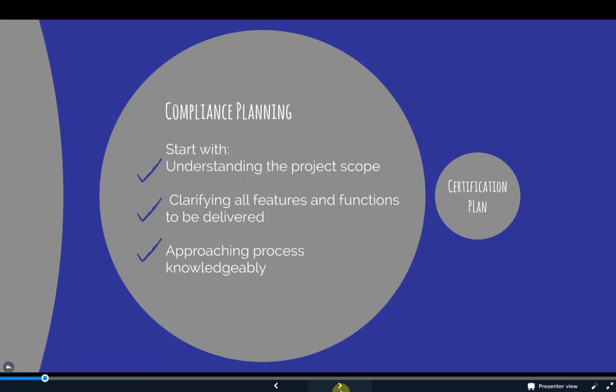Now, Order 8110.4 doesn't really define project scope, but it does state: When the certification plan does not give the FAA assurance to the applicant's understanding of the scope and magnitude of the certification project, the FAA should reject the application and consider the need for another familiarization briefing. Our planning efforts need to reflect that we understand the scope of the project fully.